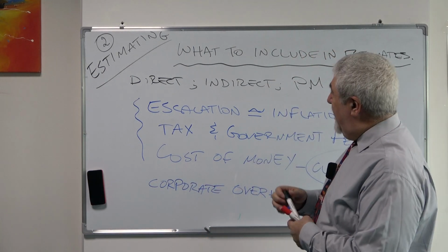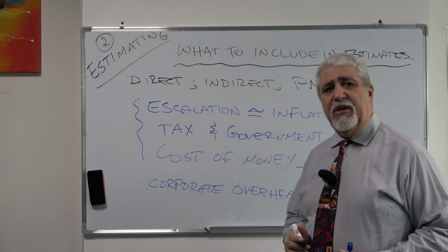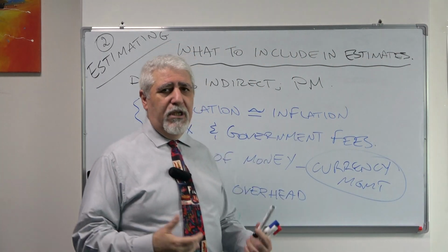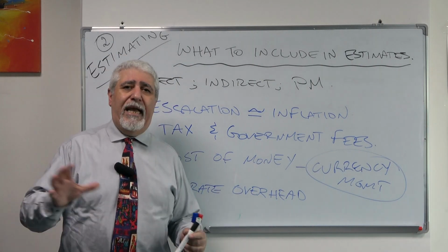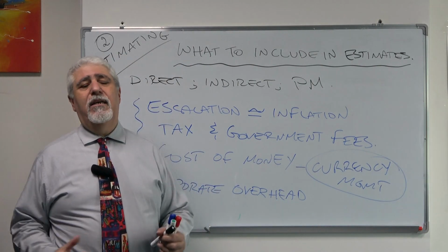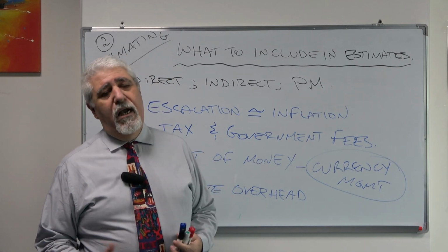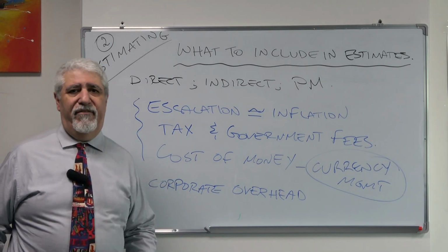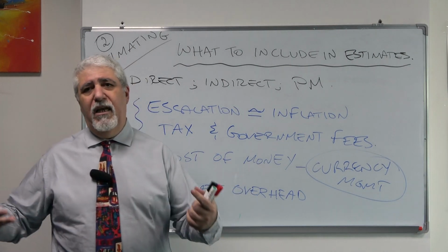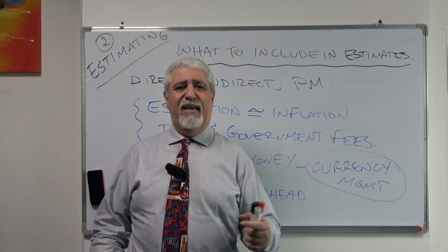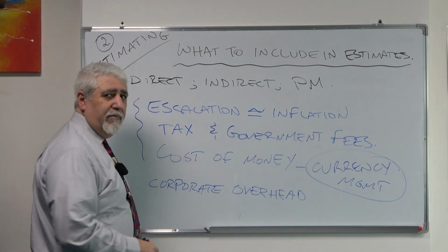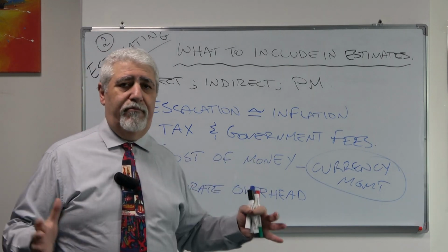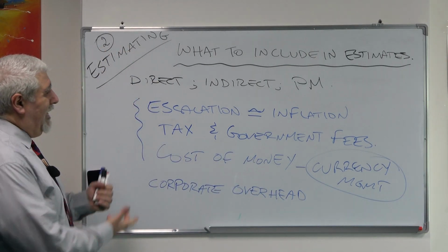What we haven't said here is that when we talk about project management costs, many organizations, especially government or those doing internal projects, don't allocate their internal costs, their office space, the salaries of their employees. In other organizations, all of those costs, even if they are internal staff, even the computers, the tools, the office space, maybe the vehicles that are assigned to us, all get charged to the project as well, because we want to have a very good idea about the total project cost. So what else?